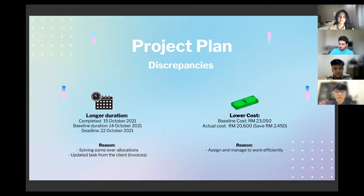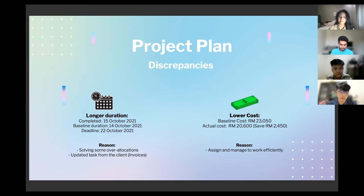For the discrepancies, the first is the longer duration. We finished our project on 15 October 2021, but our baseline duration was 14 October 2021, which means there was a one-day delay between the completed date and the baseline. However, we managed to finish the project on time and within the deadline of 22nd October 2021.